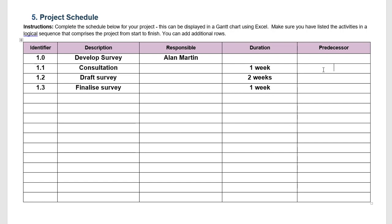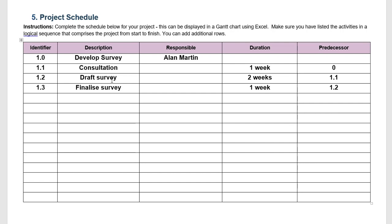The next thing to consider is what needs to come before or after other work. So does anything need to come before consultation? No. In order to draft the survey, do we need anything to be done first? Well in this case, yes, we need to consult first so we know what should be in the survey. So drafting the survey is dependent on 1.1. So 1.1 is a predecessor work that needs to be done before 1.2. And finalizing the survey is also dependent on the work of drafting the survey. We need a draft survey to send around to key stakeholders so they can give feedback and then we can finalize it ready for implementation.